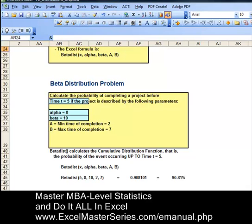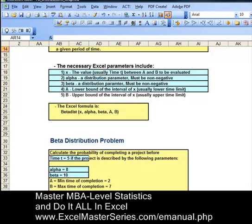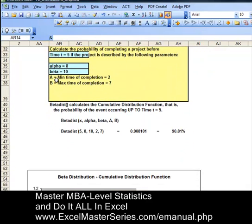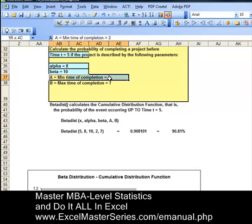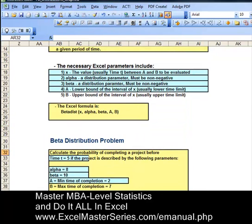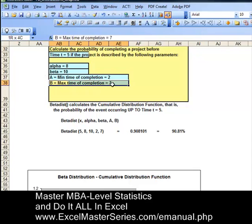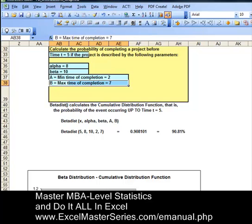In Excel, there are no spaces between numbers in the formula — we've put spaces in here to make it more readable. The fourth parameter, A, is the lower interval of time; we've set that to 2. The fifth parameter is B, the maximum time of completion, which is 7. In the middle of the page is the BETADIST formula with the parameters put in there.